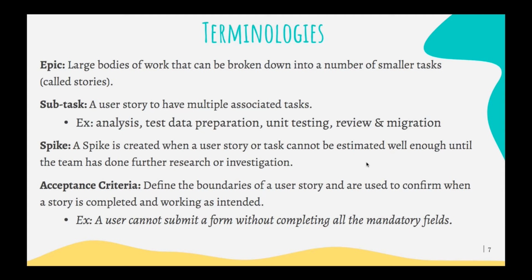So we have seen task. What is a subtask? When we have a user story that needs multiple tasks, those associated tasks are called subtasks. For example, if I get a requirement of developing something, I need to do the data analysis, test data preparation, unit testing, code review, and migration. So these are a few subtasks.